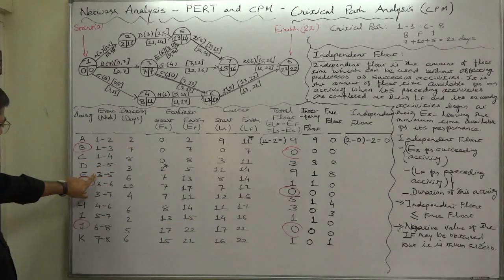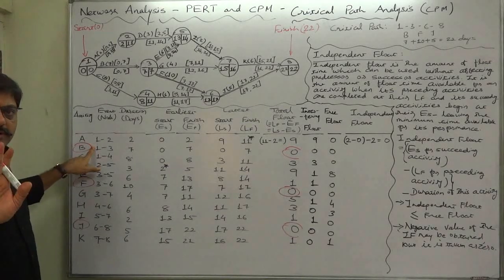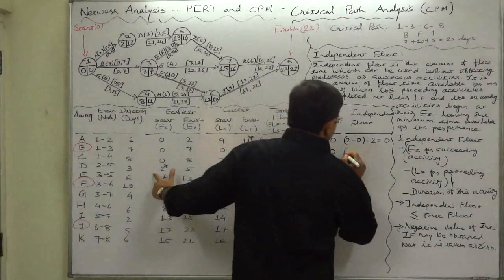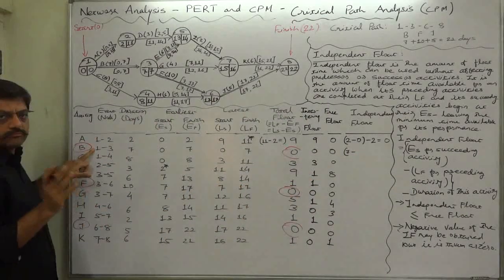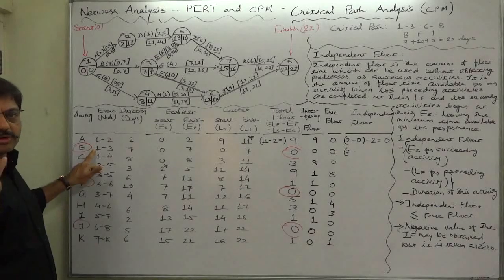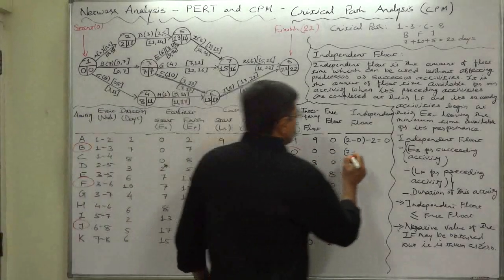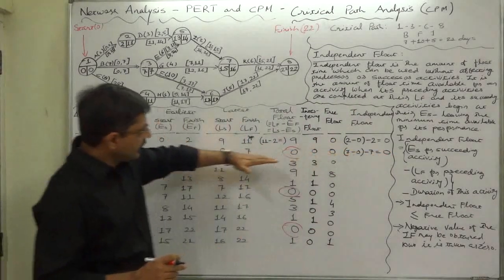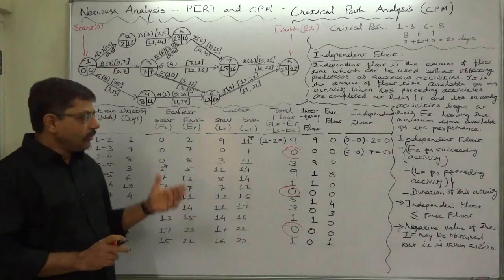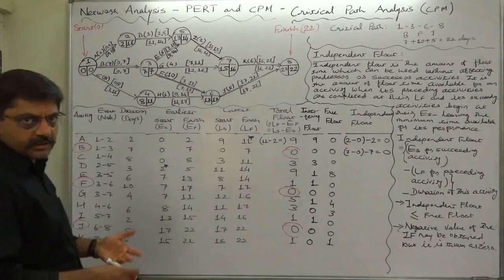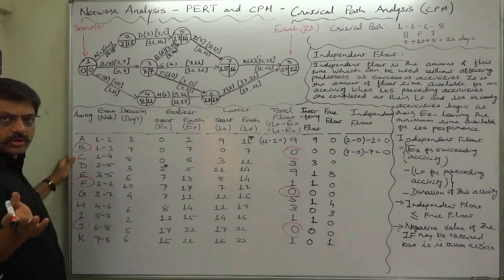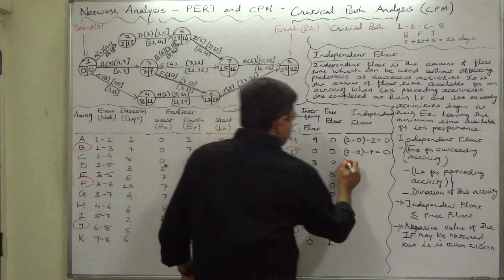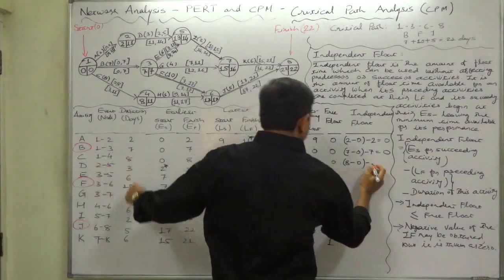Activity B (1,3): it is a critical activity so its float is always 0. Earliest start time of succeeding activity is 7, minus latest finish time of predecessor — B has no predecessor so it is 0 — gives 7 minus 0 minus duration of B (7) equals 0. All floats of critical activities are always 0. Activity C is also a start activity; its successor is H. Earliest start time of H is 8: 8 minus 0 minus duration of C (8) equals 0.